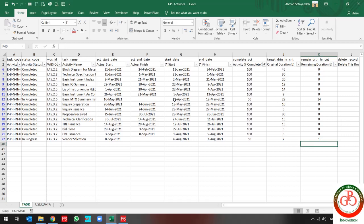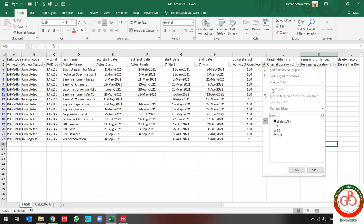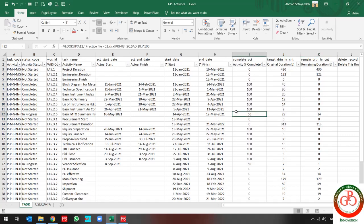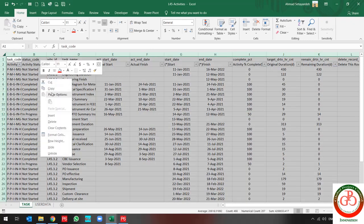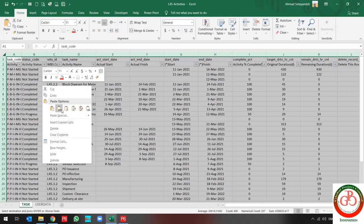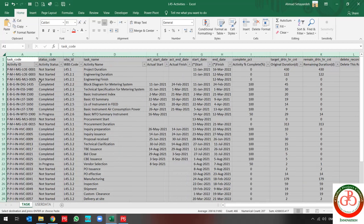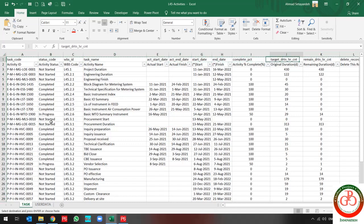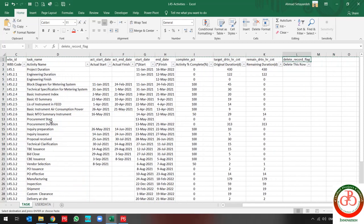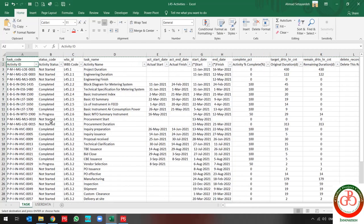My file is ready to import for the activity sheet update. Before each import, in order to change the formula to the value, do not forget to use copy and paste as value on all of your file.